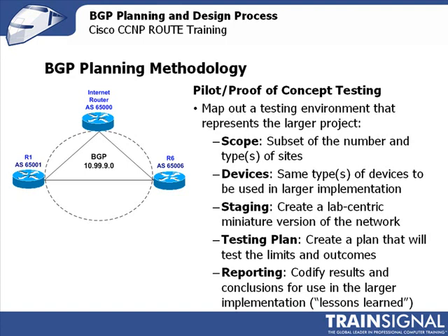Have the devices you're going to use. The staging of it should be essentially a lab miniature version of the larger network. That you know what your testing plan is, what the outcomes will be, and then how it will be reported, and how your lessons learned will be implemented in the larger project.